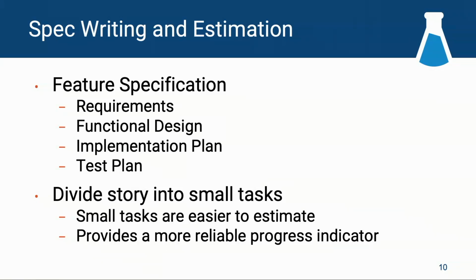And as part of the specification, or shortly after, we'll divide the story into small bite-sized tasks that can be picked up by various developers for several reasons. One of them is it's easier, and you can feel more confident in an estimate of a thing that you can say might take 3 hours versus maybe take 20 hours or a few days. It's very easy to miss things if you don't break it up into very specific tasks.